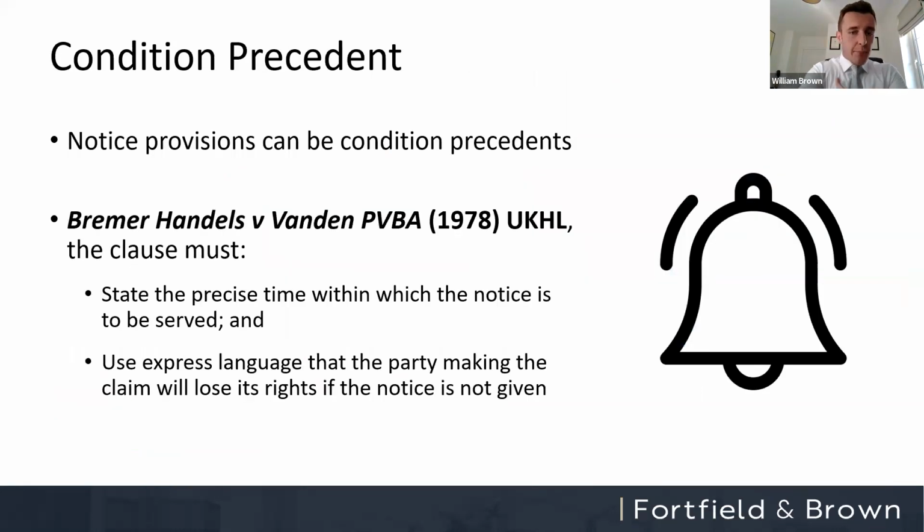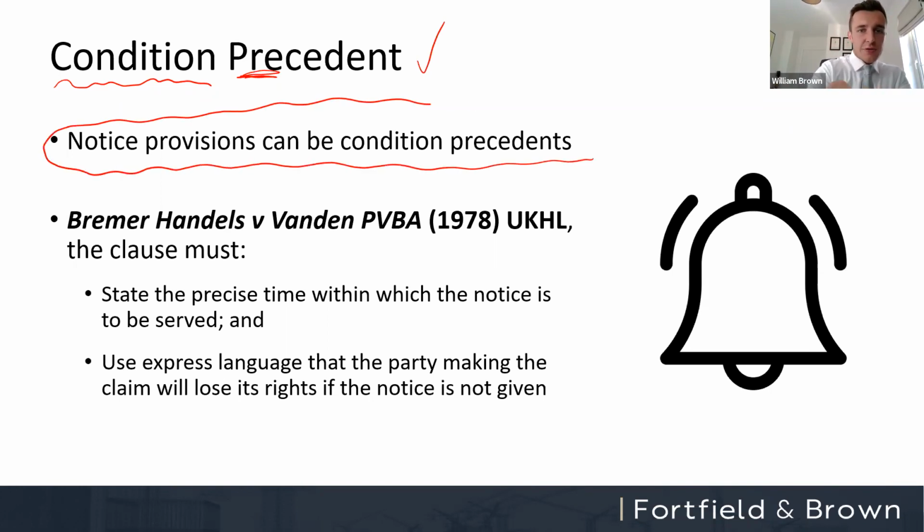This then is another important legal phrase that I think most people need to be aware of, and it's called a condition precedent. This is a fancy legal way of saying something has to be done, a condition that has to be satisfied before, again, the word pre, before something else comes into effect. In a construction context, these are normally in and around the notice provisions, where a clause of the contract requires the contractor to do something before they're entitled to something else.